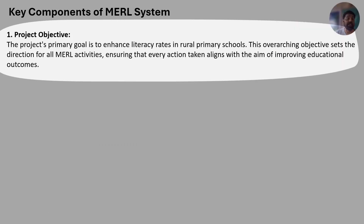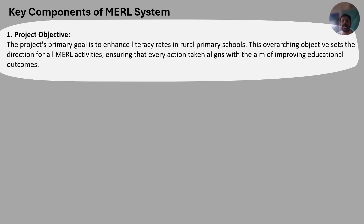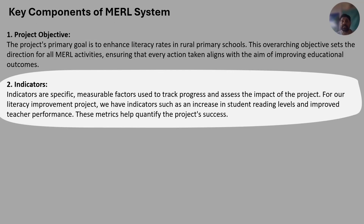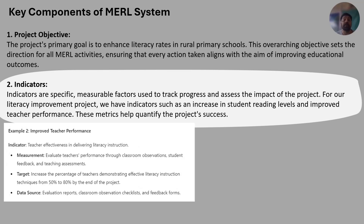Let's discuss each component. Project objective: for example, an education project to enhance literacy rates in rural primary schools sets the direction for all MNE activities, ensuring every action aligns with improving educational outcomes. Indicators are specific measurable factors used to track progress and assess impact — for the literacy project, indicators include increases in student reading levels and improved teacher performance.